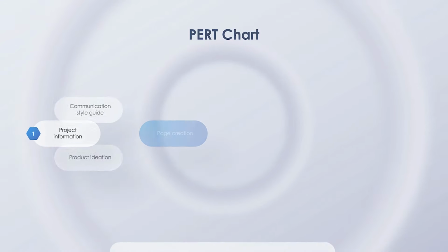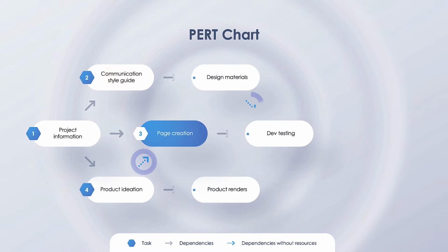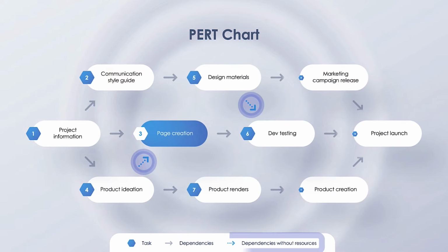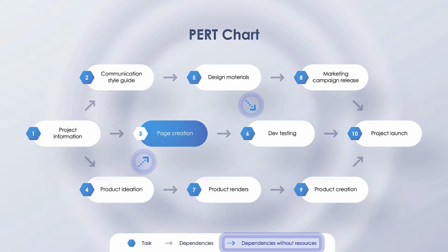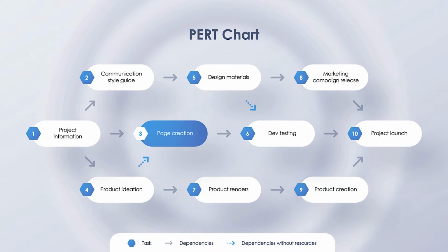One of the ways the project saved time was not waiting for the town to be built before they started work on the dam. If this was visualized on a PERT chart, the project planners could see that the 2 tasks were dependent without resources, as noted by the blue arrows in this visualization, since one required concrete and steel and the other required lumber and food.